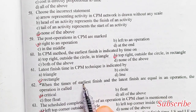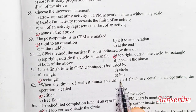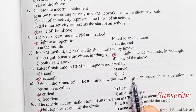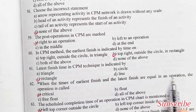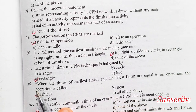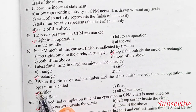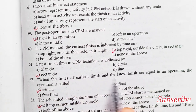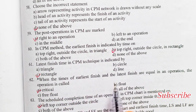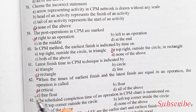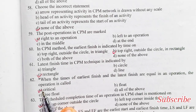When the earliest finish time and the latest finish time are equal in an operation, the operation is called: critical, float, free float, or all of the above. Option A is the right answer — critical.